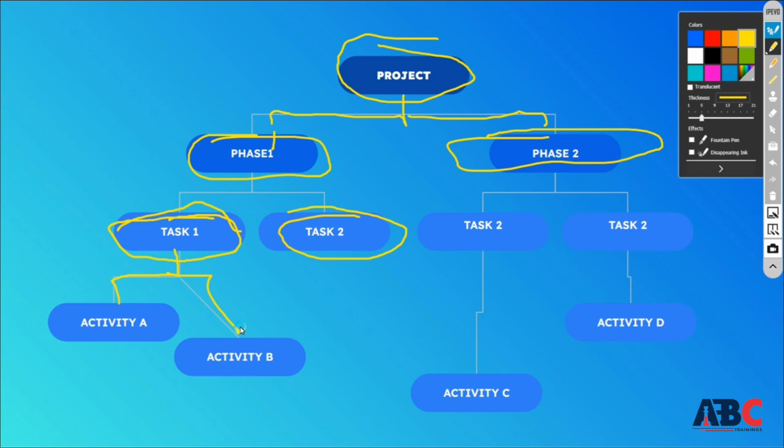Consider that there is going to be construction of an apartment building, in which the construction of a big apartment is going on in 2 or 3 phases. There is A wing, B wing, C wing. We will not start all together. First A wing will start working, then B will start working, then C will start working. So we divide the work in phases like this.